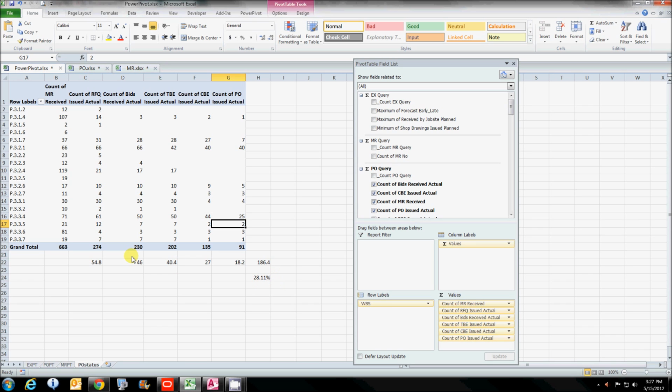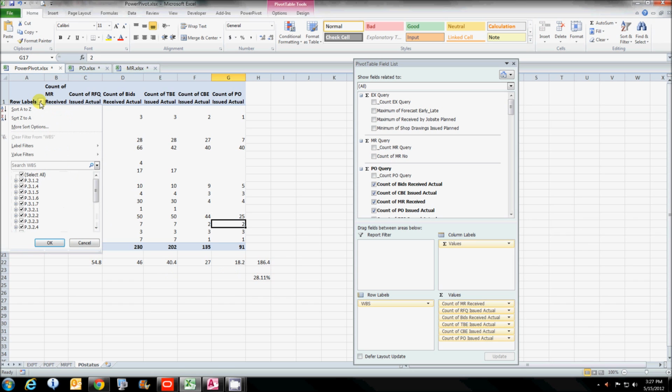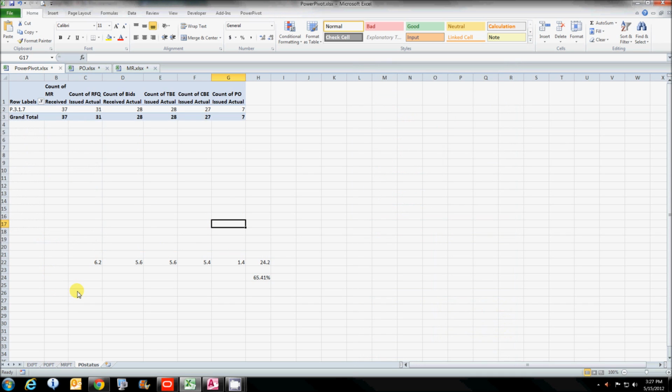And this, overall, I'm saying that we're about 28%, but overall doesn't do me any good. What I want to look at here is my particular case, which is the module there for building A. And I have 37 POs, and I show, giving my rules of credit, these are the various steps that have been completed for each one of those.